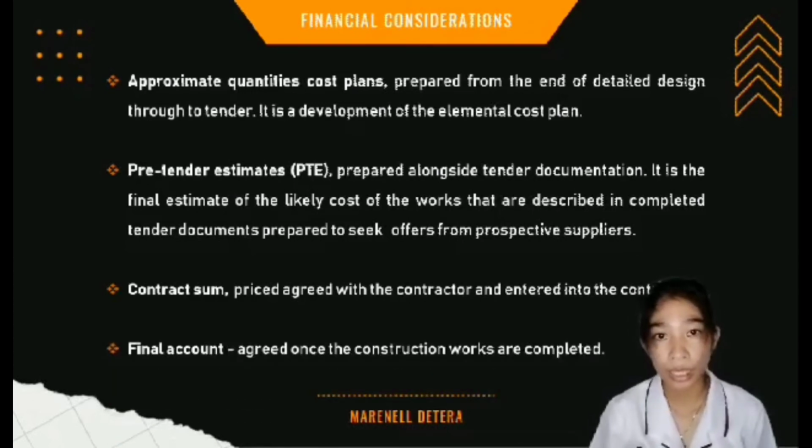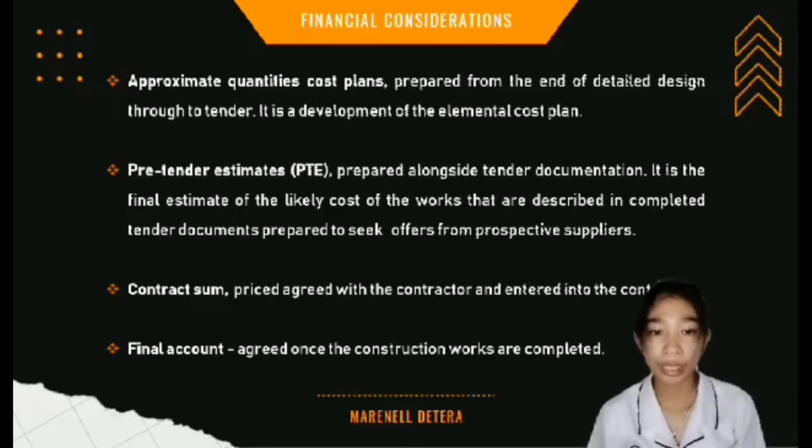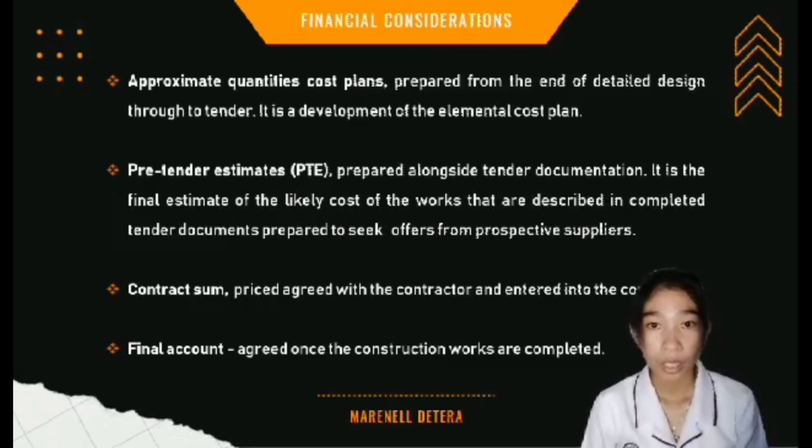The last one is the final account. The final account is agreed once the construction works are completed. Preparing final account is the process of calculating and agreeing any adjustments to the contract so that the amount of the final payment can be determined.